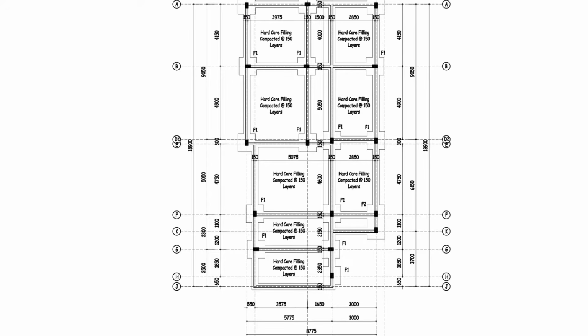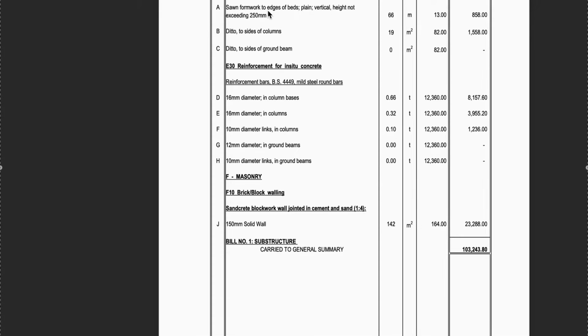The standard bill of quantity starts with giving your engineer or your quantity surveyor the structural drawing. The structural drawing would contain a foundation layout which tells the quantity surveyor the base of your building, what needs to be filled, where the columns are, the sizes and everything.